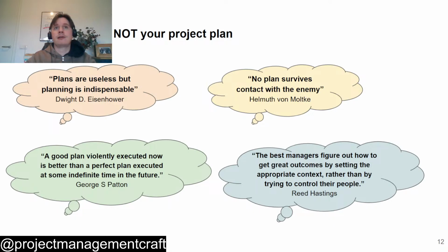He answered, I copied from the other timeline. If it's wrong here, it's also wrong there. And I answered, well, the other project has different sample requirements. Here the sample requirements are higher, so you cannot copy the same duration. Again, he was quiet. What I was trying to understand was his way of thinking to estimate those tasks. This discussion went on for a couple more questions. At some point I said, let's stop here. Listen.